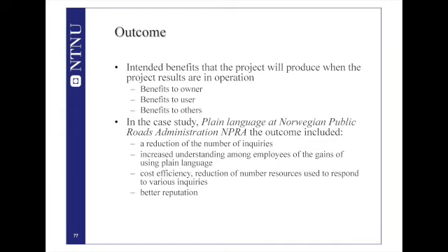And the purpose or the mission of that particular project was to make these letters understandable. That's all. To make the letters sent to the customers more understandable. And what will be the consequences of that? What will happen if you make the letters that you send annually more understandable?